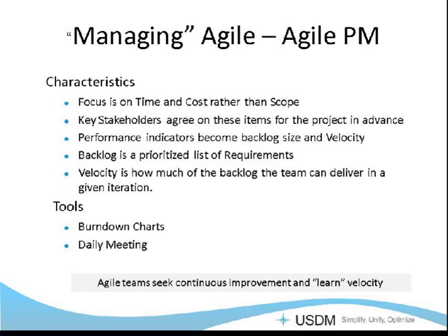And so as a project manager then, as you continuously learn and continuously reevaluate where you actually stand, you can see which side of that line you fall on. Am I ahead of schedule or am I behind schedule? And it's a very simple way to see exactly where you stand along that line.